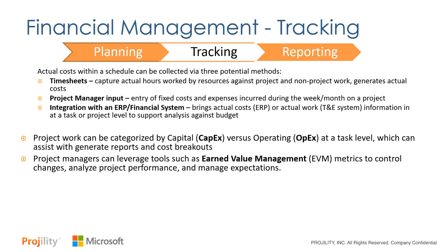Often project managers can start using tools if they're actually capturing at least high-level costs in their schedules. They can use earned value management, or EVM, to control any changes, to analyze things like performance, to look at your estimated completion, your baseline cost of work scheduled, your actual cost of work scheduled, and look at the actual cost of work remaining. You can start to manage expectations.